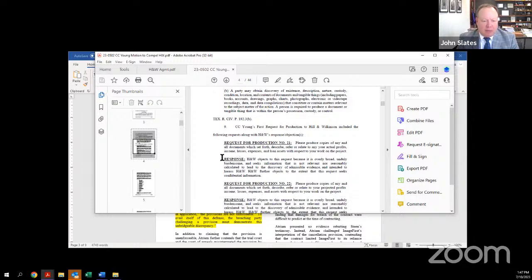I understand their argument, but I think it's an important distinction to say it's completely out of context with the case law that has addressed liquidated damages. I'm not aware of any case that has characterized a fixed labor rate as liquidated damages. If we were to characterize fixed labor rates as liquidated damages, we would create a whole new area of law, really, that I've never seen before in 28 years of construction practice. So there is that. With respect to them having the ability to verify what those actual costs are.